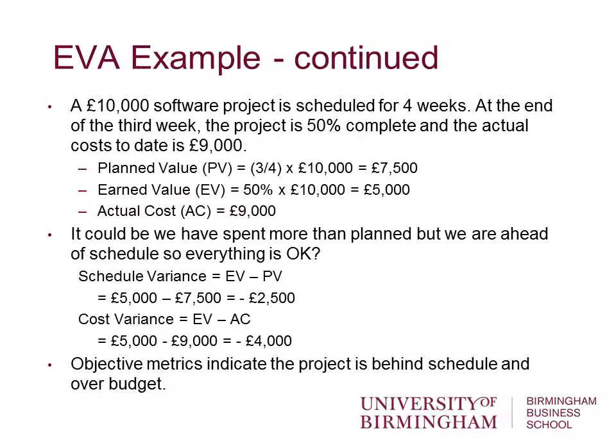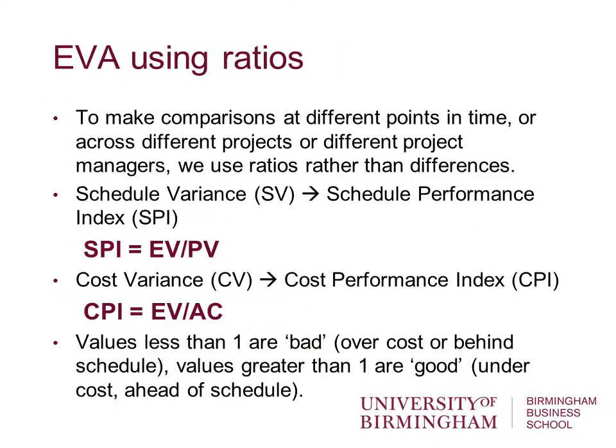Objective metrics show that the project is behind schedule and over budget. So let's think about how we can compare this project against other projects, or even give us a comparable figure. We use something called the schedule or cost performance index, and you can see that in this case we're no longer subtracting but dividing.